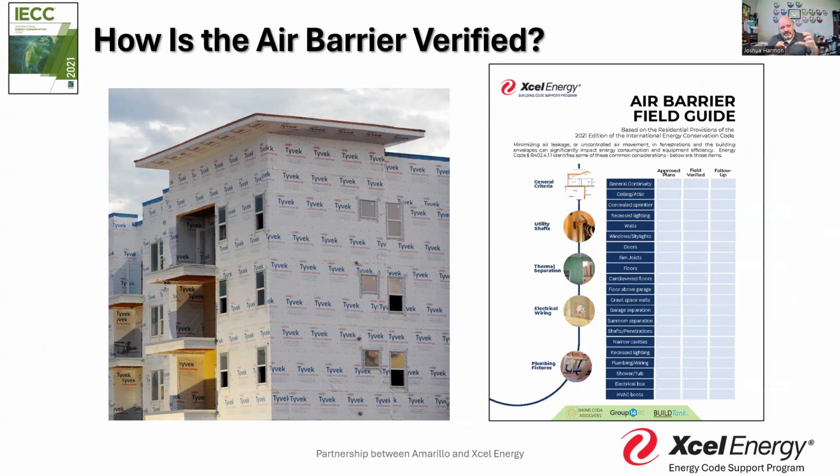Again, we do the systematic periodic inspections. This to me is that depending on what we're looking at, if it's a multifamily, if it's a single family, who's going to be there the entire time watching it? Well, is it me or is it going to be some approved third party? That's a conversation that we should know from the beginning so that we don't have this last minute, hey, I was supposed to get this inspected 3 weeks ago. Who's going to come out here and do that? Well, it's not going to be the building inspector. You should have had somebody do that verification themselves.